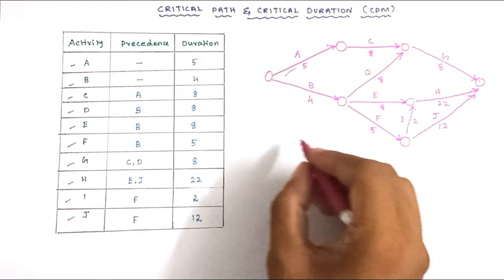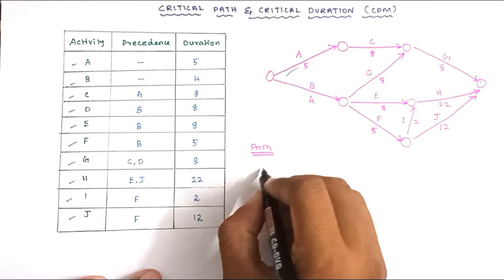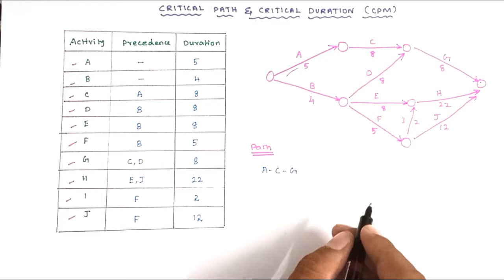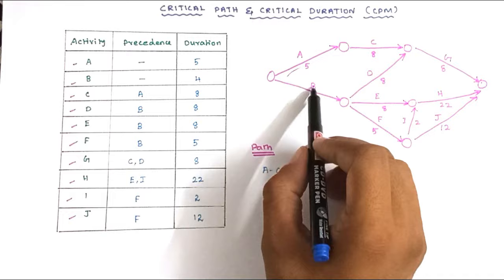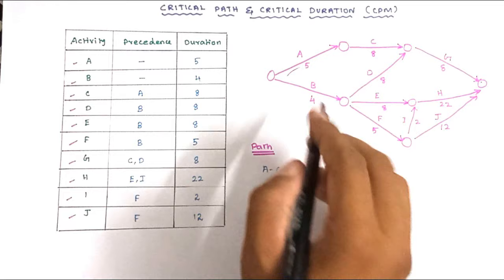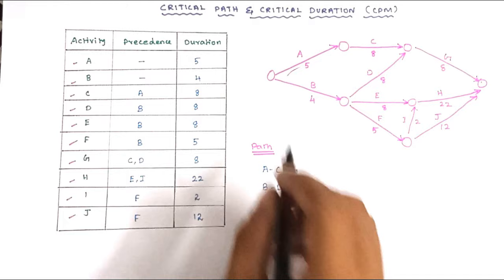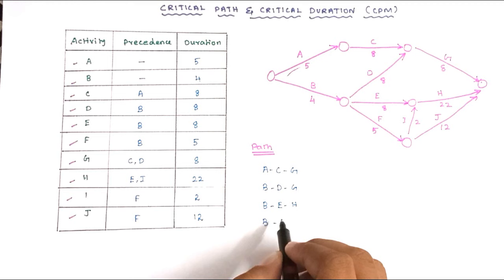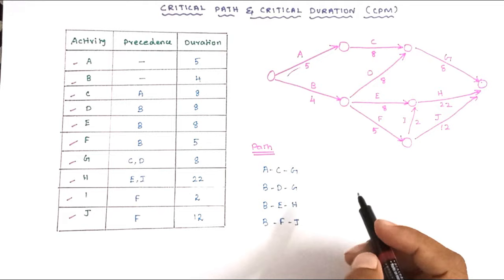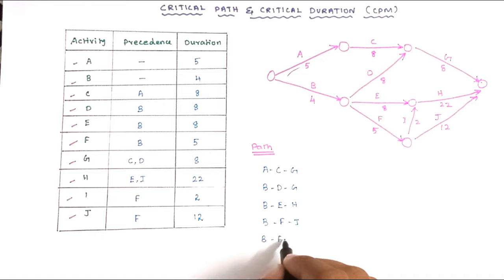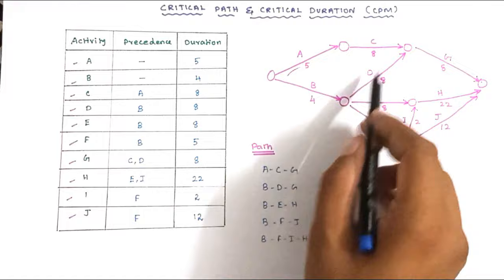Path 1 is A–C–G. Path 2 is B–D–G. Path 3 is B–E–H. Path 4 is B–F–J. Path 5 is B–F–I–H. So there are five paths in this network diagram.